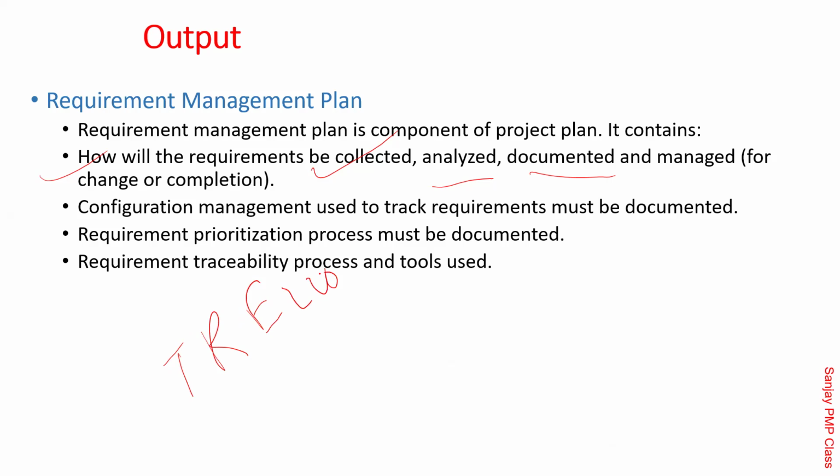Then configuration management to track requirements: how are you going to give a unique number to each requirement? And if there is a change, how are you going to handle it? Remember, if there are changes in the requirements down the line, it becomes a nightmare. He will give you some requirement in the beginning and then come back and say, I think you should also include this.